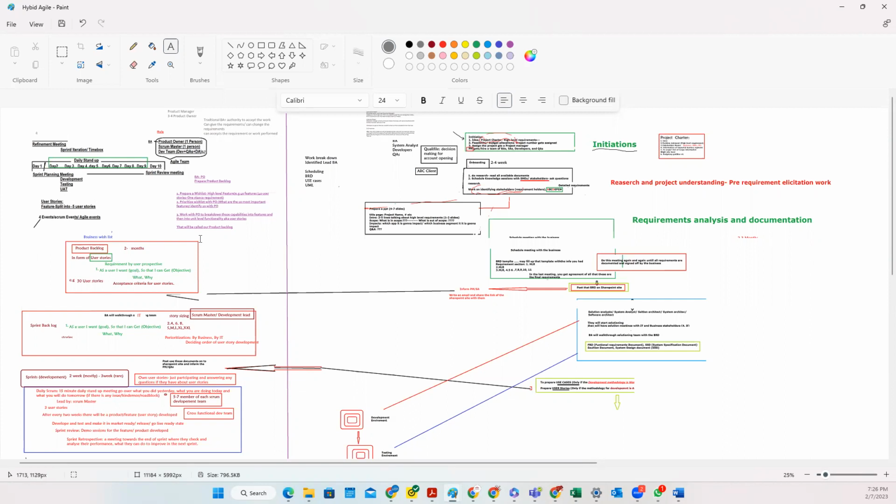If they are able to get it done within one day, they will size it as 1. If they are sizing it as 8, that means it's too big. So that is another indicator of when stories need to be split.